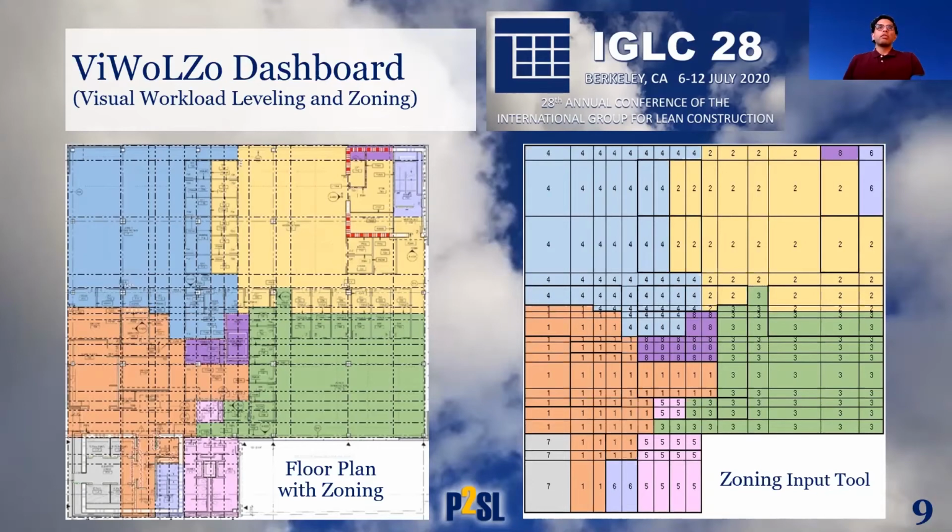The tool then filters all the work density underlying the dashboard based on the zoning on the left, adds up the work densities in the cells of each zone, and plots the workload on a histogram. To give you some perspective, there were 267 different cells for 19 different steps. Thus, a total of 5,063 work density values were produced.